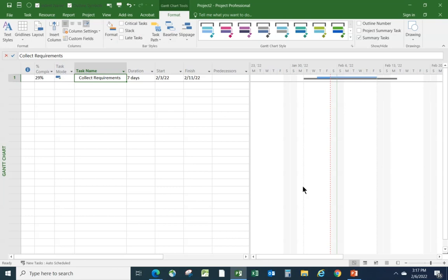When we first planned this task, we were planning that it would start on that Tuesday there and finish at the end of the following Monday. But since then, we've been told by the person doing the work that they started later, and they did that because they could actually get this task done quicker than we allocated for it. So now we can see that we could make up a little bit of time in the rest of our schedule there. If this had successors, those would all have been pulled in a little bit, allowed to start earlier as a result of the fact that this task here finished early.